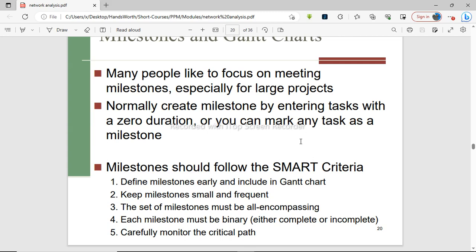Try the best you can to keep them small, those small things, but they matter. For example, having initiated a project is a milestone on its own. You shouldn't just wait until we finish the entire project before creating a milestone. No, just small achievements that you are making. Once we achieve this, then we'll say we have achieved something.